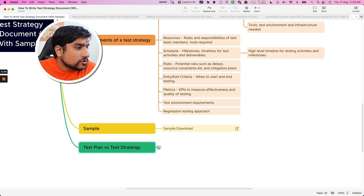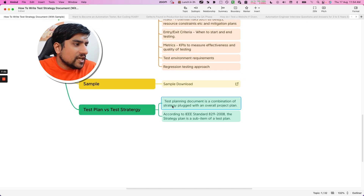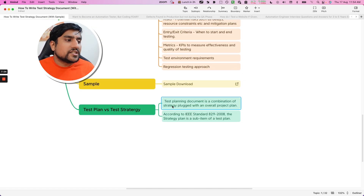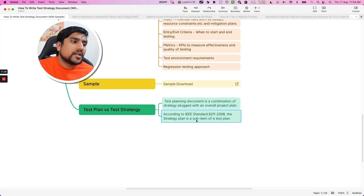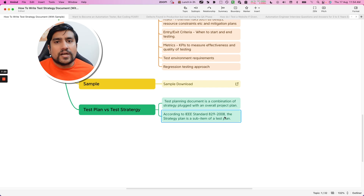Now the main interview question: test plan versus test strategy. A test plan is a combination of strategy plus the overall project plan. So test plan is basically test strategy plus project plan — it's a bigger version of it. This strategy is actually a subset of the test plan as per the IEEE standard 829-2008. Many people actually don't know — test strategy is nothing but a smaller set of your test plan. Test plans also include project plan and other things.